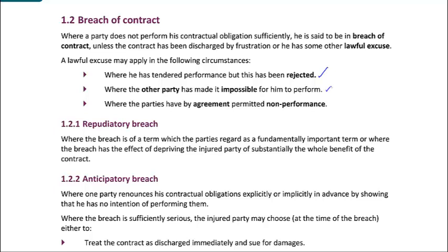What may also happen is that the parties will agree not to complete the contract. So imagine, for instance, you have a builder, and I know someone who had this problem. They had a builder, they did a lot of work, but the windows they'd fitted were pretty shoddy. And in the end, my friend said to the builder, look, you can either come back, take all those windows out and refit them properly, or you can go away and I won't pay you the last instalment of your bill, and I'll get someone else to finish the windows off for me.